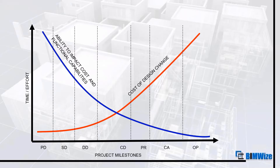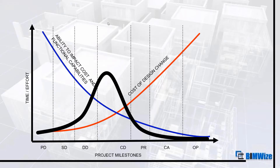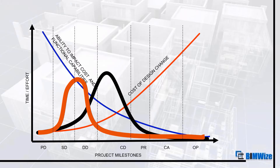If we have to make a design change at that point in time, it is just going to push the project really over budget. What our traditional design process does, especially when adopting CAD, is concentrate all effort between design development and construction document stages. But what the BIM process does is front-load decisions right where cost impact is really low, but the effect of design change is really high. It's all about when and how we make design changes in the process.